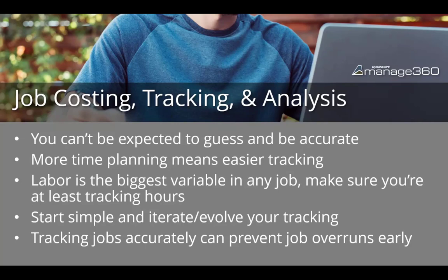If you're not currently job costing or job tracking, start simple and iterate or evolve your tracking process. Maybe start out by just tracking the amount of time that you're spending on jobs versus how much time you thought you were going to be spending on jobs.